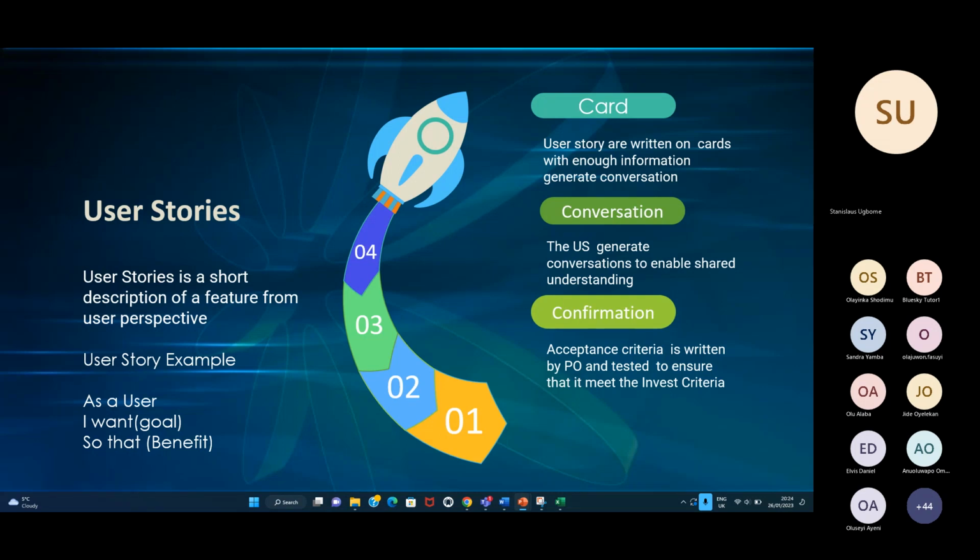What I showed you in the result document is a project plan, and that was what we used to do before. If you are using a traditional waterfall approach, waterfall is a project approach whereby each project is developed sequentially. You need to elicit your requirement, collect your project mandate, create the user story. Then when you finish project specification, high-level requirement, low-level requirement, you create everything first. Everything is complete before you can even start saying that you want to start doing the wireframe.